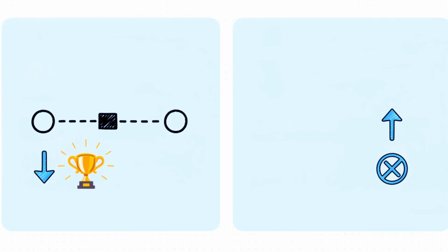If, after all those mandatory exclusions, exactly two valid bids remain, they will always be perfectly equidistant to their average. Let's say you have one bid at 96 million rupees and another at 108 million rupees. Their average is exactly 102 million rupees. Both are exactly 6 million rupees away from the average. Because they are tied in distance, that tie rule kicks in automatically, meaning the lower bid mathematically wins every single time.